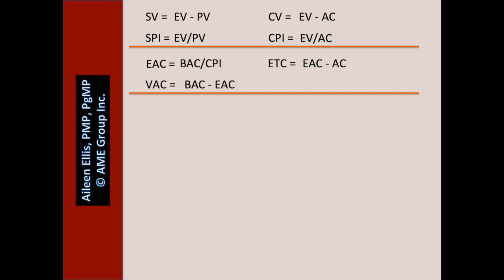The last idea for the exam related to earned value, as far as a formula, is TCPI. Common sense, I think of TCPI equals work remaining divided by money remaining. Now, I probably wouldn't write that down when I'm doing my data dump for the exam, but it helps us here. They could ask for the TCPI two different ways.